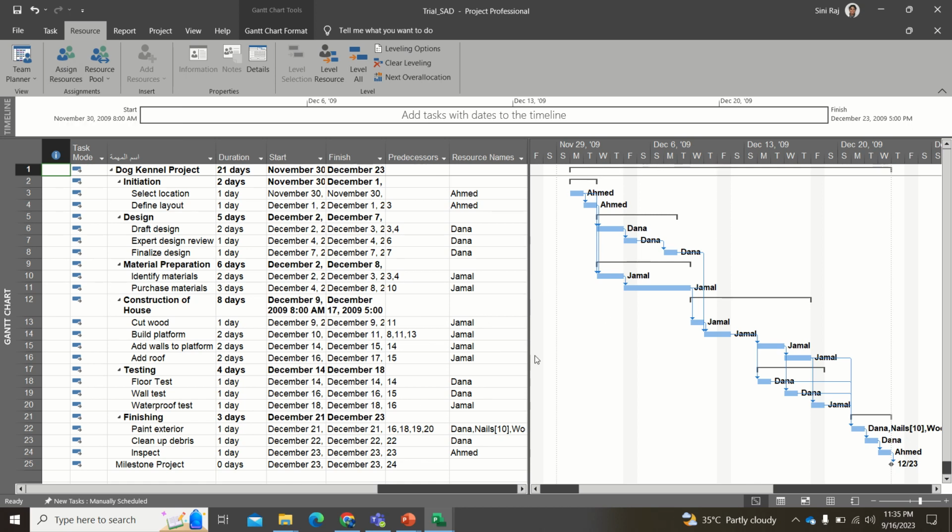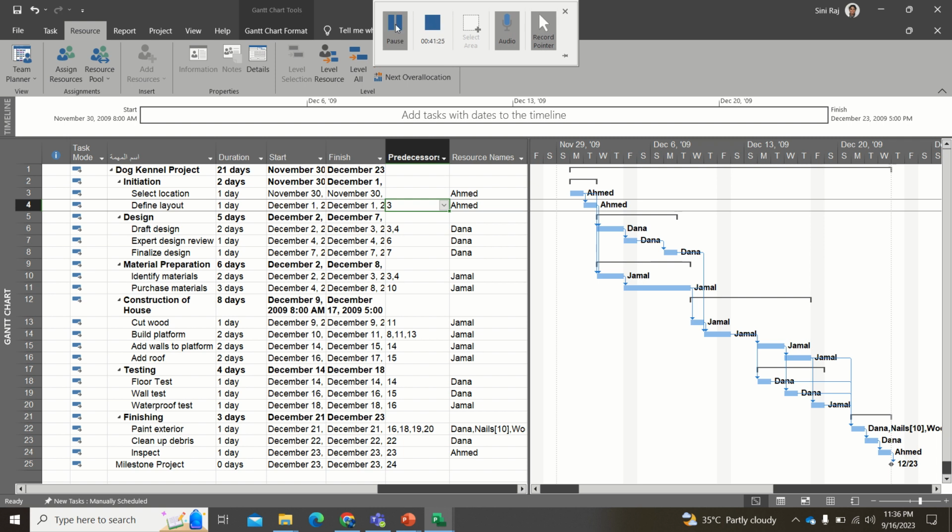It's not only that you have to shift the names; you can also see if you can adapt more days, then you could go for this. Say you have to finish setting up the kennel in 17 days, then you cannot do this. So according to the constraints of your project, you have to select what to do. This is how you do resource allocation.